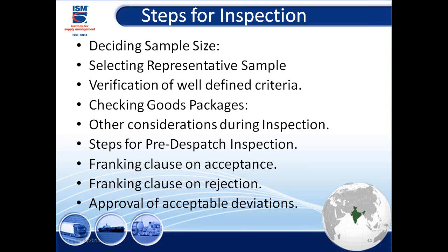Steps for pre-shipment inspections: the franking clause. I know these are little outdated words, but I'm using it. I don't know, in the public sector it still goes on, the franking clause. Like a check in the good old days, you used to put a stamp and frank it, to show the check has been encashed. Now even the banks don't do the franking. But I know some companies in the public sector do the franking clause on acceptance. On the certificate, they have to put down, yes, accepted, with the signature, the name and the title of the person, and the date. In the same way, when you're rejecting, you have to frank it again. Then approval of the acceptable deviations.